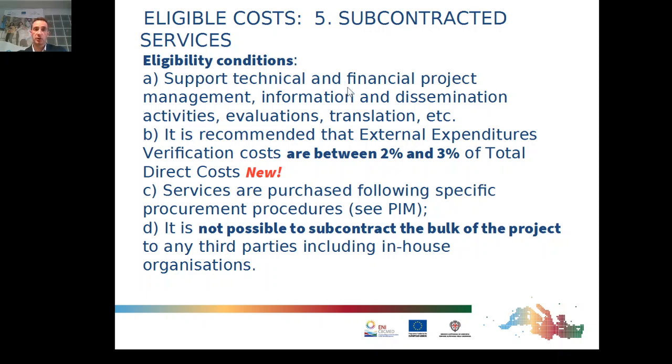Support technical and financial project management, information and dissemination activities, like translations, organizations of seminars, of conferences, evaluations, and so on. We also have here the external expenditure verification costs. That should be between 2 and 3% of the total direct costs, and this is new, so pay attention to this. And do not forget to include the audit costs, meaning the expenditure verification cost, in your budget. This is a very important thing to remember.